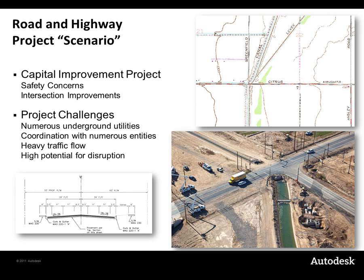In addition, we are very close to several irrigation canals that are under the control of another regulatory agency. To make matters worse, the main road is a designated truck route that handles a substantial amount of traffic every day. As a result, performing any work in this location has the high potential for disruption.